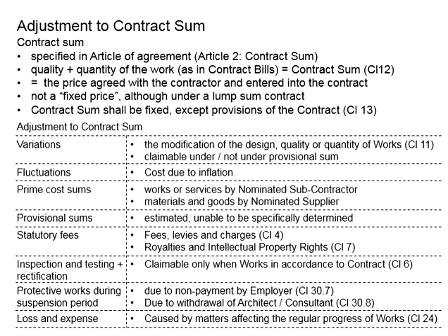You know that the PAM contract is by default a lump sum contract. Even though it is a lump sum contract, it doesn't mean that the contract sum cannot be adjusted. The lump sum here is on the basis of the details given in the contract bills. Therefore, this contract sum is not a fixed price, especially when there are any items within the work that are not in accordance with the contract bills eventually.